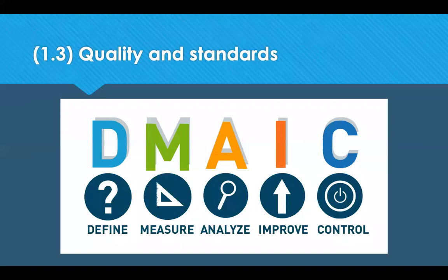Now, there was another author called Crosby that outlined some absolutes of quality. He said that quality means conformance, not goodness or elegance. And there is no such thing as a quality problem or the economics of quality, because it's always easier to get the job right and on time. The only performance measurement is the cost of quality, and the only performance standard is zero defects.